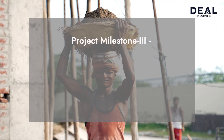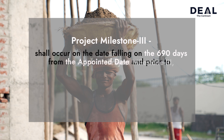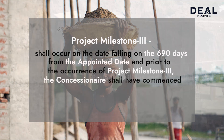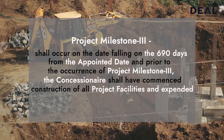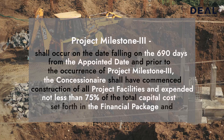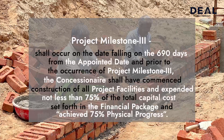Project Milestone 3 shall occur on the date falling on the 690th day from the appointed date. Prior to the occurrence of Project Milestone 3, the concessionaire shall have commenced construction of all project facilities and expended not less than 75% of the total capital cost set forth in the financial package, and also achieved 75% of physical progress.